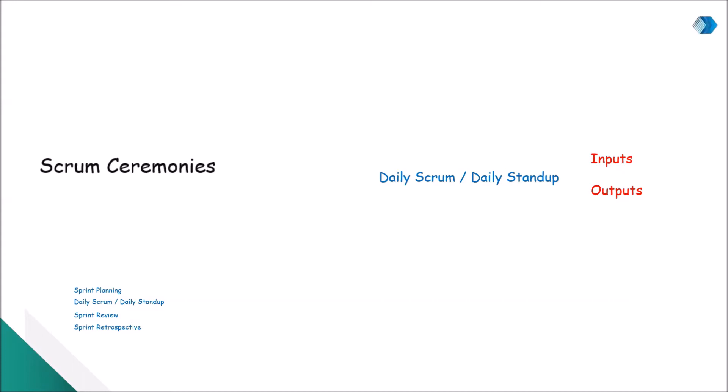Every team member is supposed to speak for two to three minutes on three basic questions: One, what was done by the team member in the last 24 hours to meet the Sprint goal? Two, what is the plan for today? And three, are there any impediments in the progress of meeting the Sprint goal? Ideally, this meeting is held for no more than 15 minutes. The Development Team is required to attend. For any impediments reported, it is the Scrum Master's responsibility to help the team member resolve the issue.